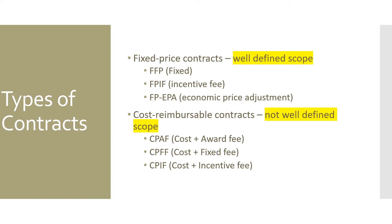The second type is the cost reimbursable contract, used when the scope is not well defined and you're anticipating changes. You do the work and the buyer reimburses the cost along with the profit. Types include Cost Plus Award Fee, Cost Plus Fixed Fee, and Cost Plus Incentive Fee — where fixed fee is the profit component and award or incentive is on top of that.